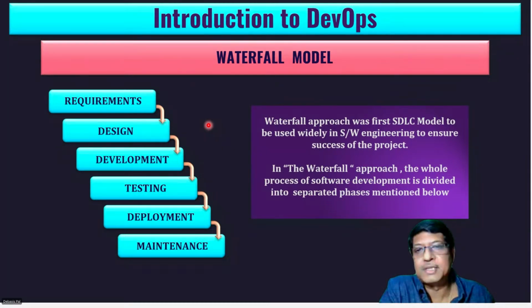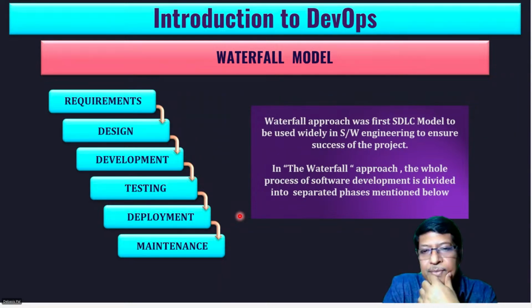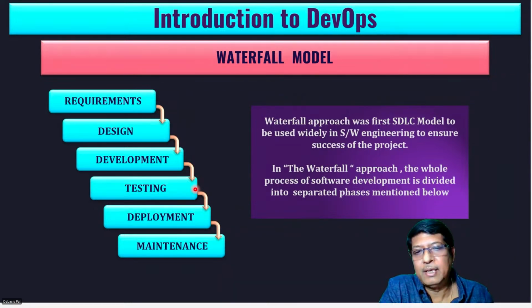For each of these, you have to get an approval from the client based on the documentation. The client will see the product only in the pre-production and the UAT, user acceptance testing, not even in the SIT, system integration testing. But at each and every stage, it can come from development to the testing only after there is an exit gate approval.